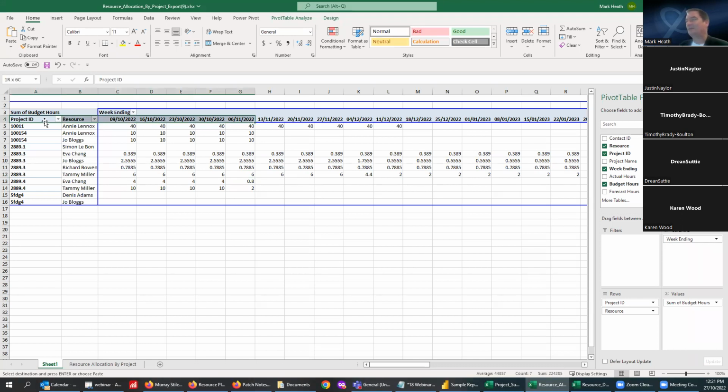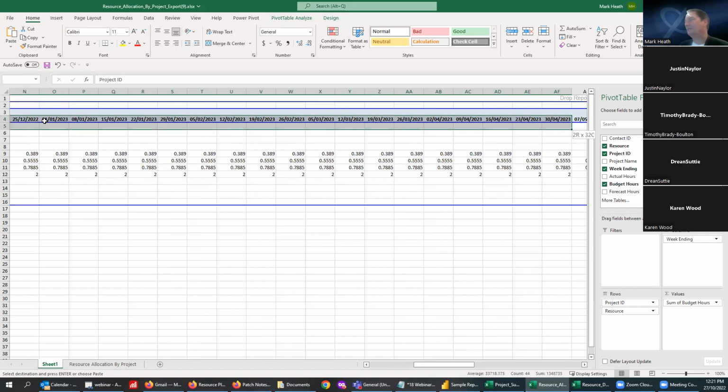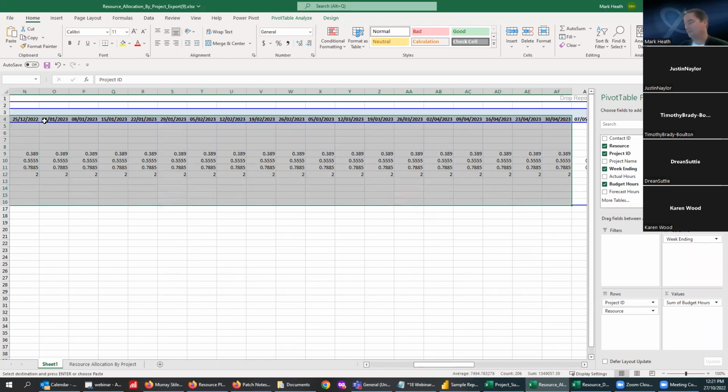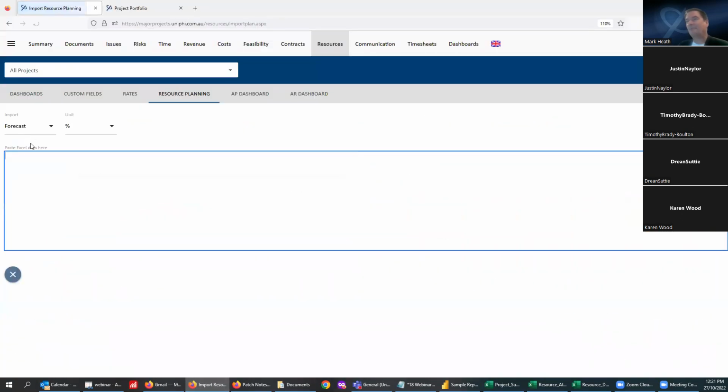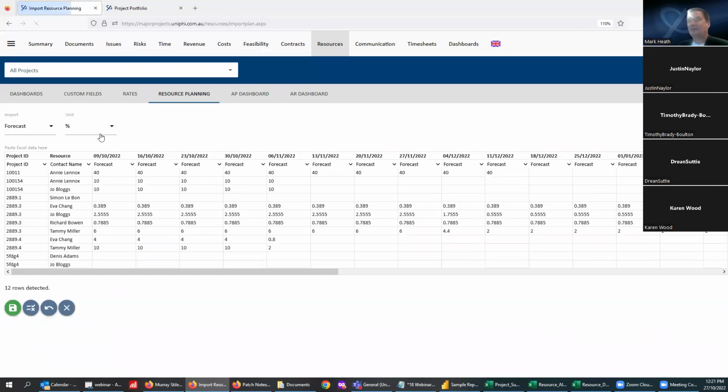And so what I'm going to do here, this is a pivot table, doesn't matter. I can still just copy out of it. I'll just do that much, doesn't really matter. And I go back into UniPhi, I click the import button, I click paste, it's hours. And you can see, because I've done this before, it's automatically picked up the mapping. And you'll see that this is more than one project. We've got 1, 2, 3, 4, 5 projects being imported here. Again, you get the validate button to test everything's fine, and you hit save, and that data then gets imported across the portfolio. So huge data uptake if you've done resource planning in other sources and you want to get that portfolio view.